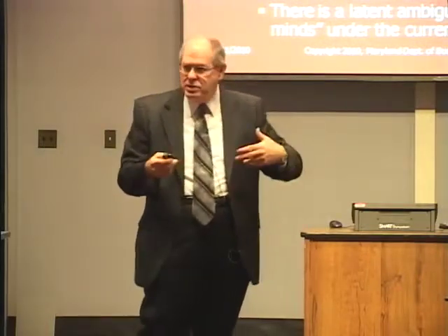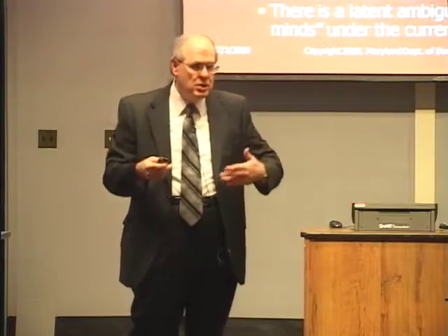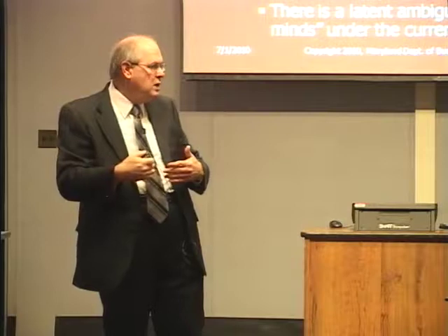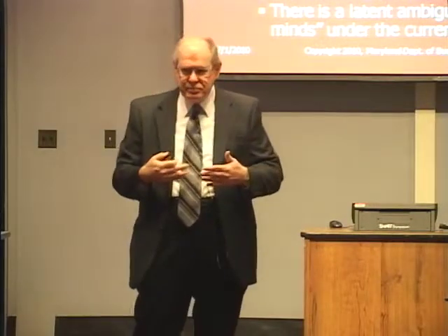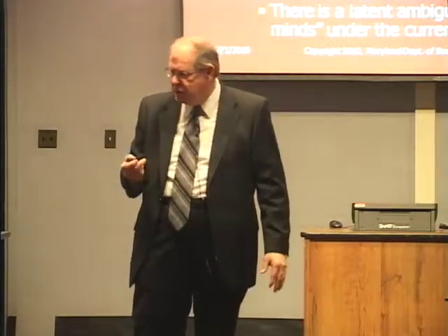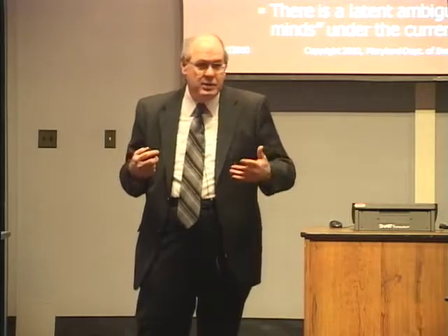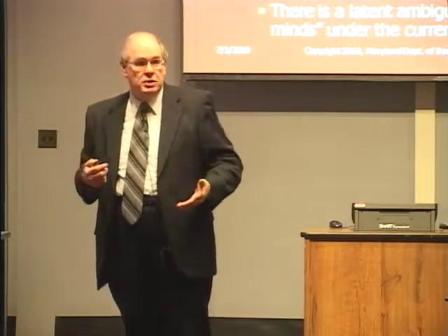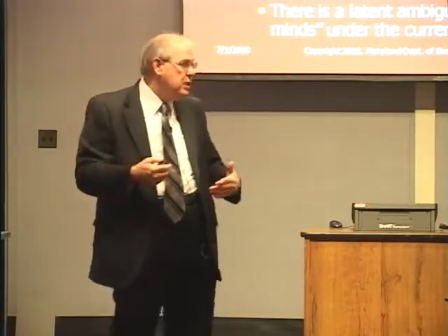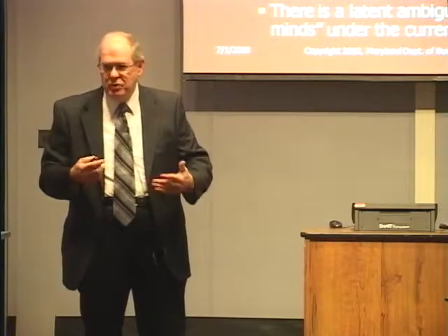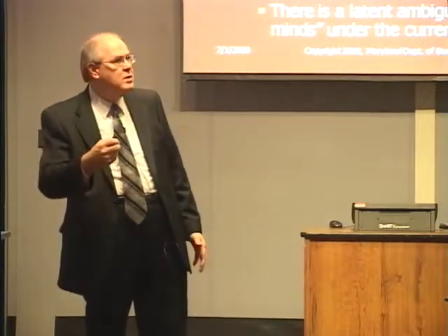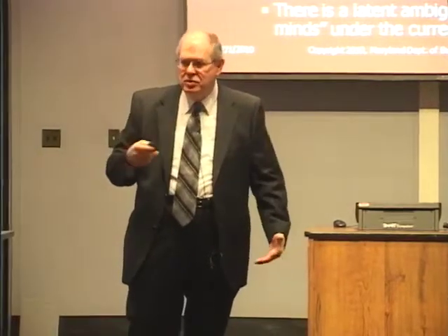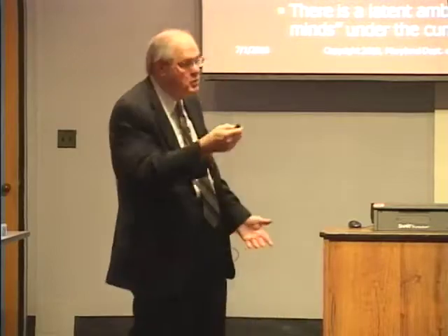But that's a concept, and that can color what you agree to if the vendor gives you their evidence of why they had the interpretation they do, and you work with your Assistant Attorney General, and if you both agree, gee, now that I see their standpoint and I see their explanation, it has a lot of credibility. If that's what you think, you're going to be more agreeable to various things to come to a modification. If it's not a latent ambiguity, you're not going to be highly agreeable. So that's where that comes in.